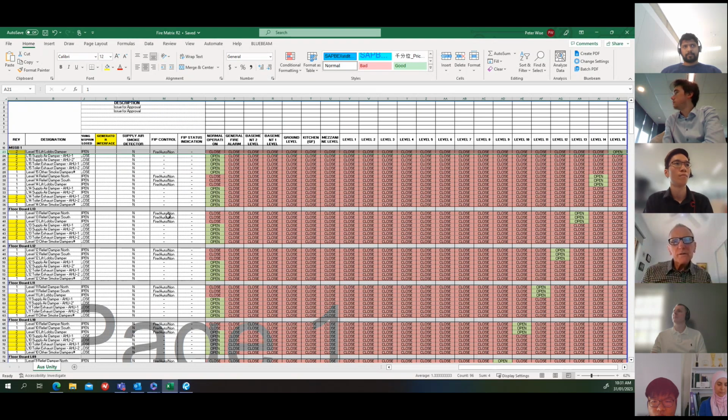On the contracting side, the process normally is to schedule all the equipment, and then do the electrical schedule to go with that, so that the subcontract electrician can be issued with that, so he can start working on the project. And pretty much straight after that electrical schedule is prepared, we would be working on the fire matrix.